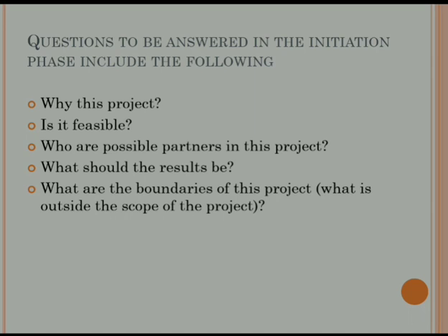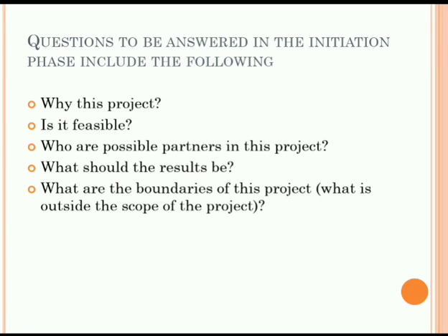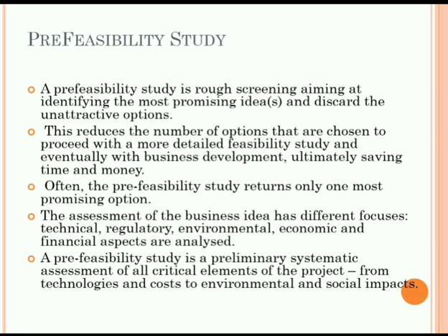Now let us see the next point, that is pre-feasibility study. Now let us see what is actually the meaning of pre-feasibility study. A pre-feasibility study is a rough screening aiming at identifying the most promising idea and discarding the unattractive options. This reduces the number of options that are chosen to proceed with a more detailed feasibility study and eventually with business development, ultimately saving time and money.